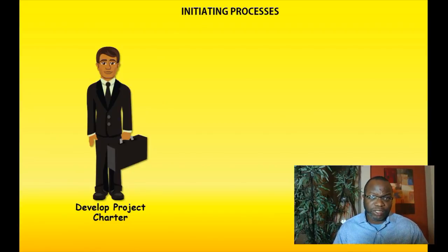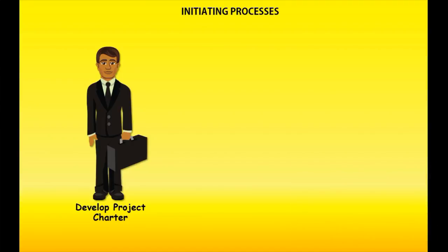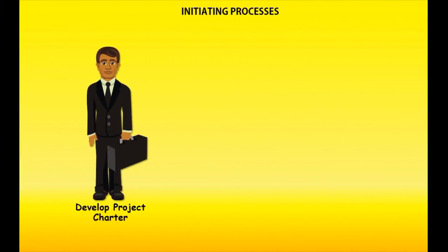In develop project charter, the project manager and the project sponsor are involved in developing a project charter that authorizes the project. The project charter is a document that authorizes the project, that identifies the project manager, that also clarifies at a very high level the scope, the risks, milestones, any constraints, but it's a very high-level document.